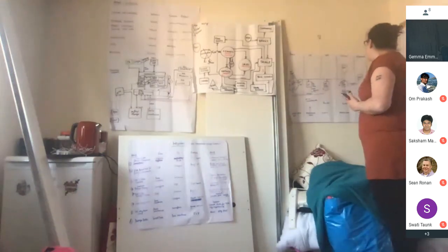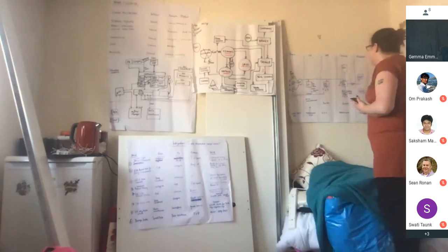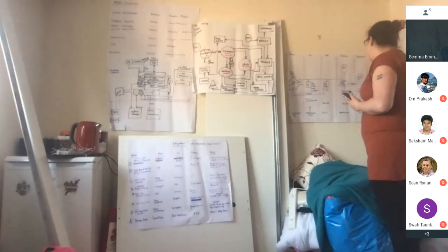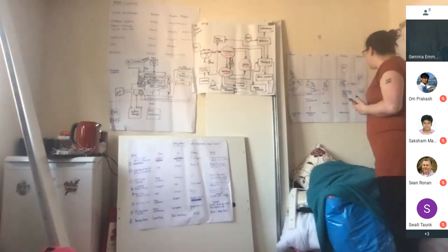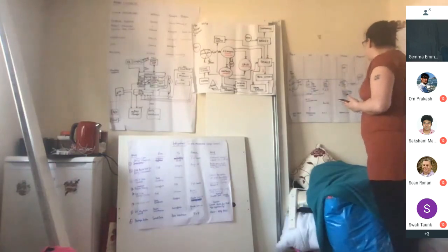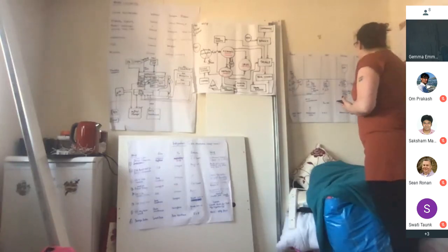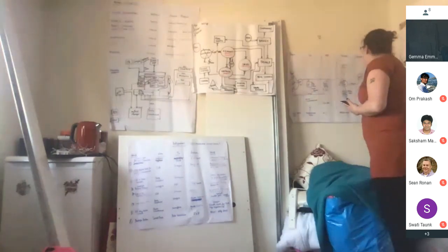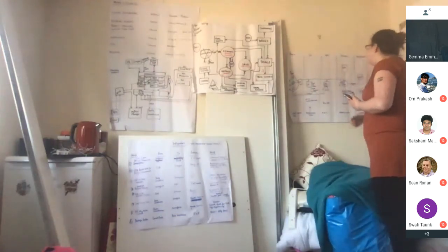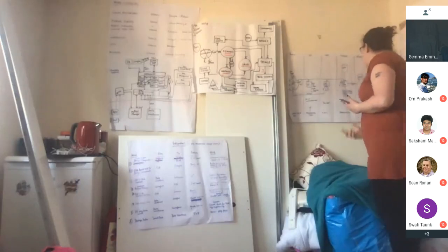At that point, my UAT sandbox would be a partial copy as well, because they need a small subset of data, but it would be anonymized at this point, so I'd create some scripts to anonymize the data. We then also clone the sandbox, which is a new feature, to create a training sandbox for users to start being trained before we go live for the first time.